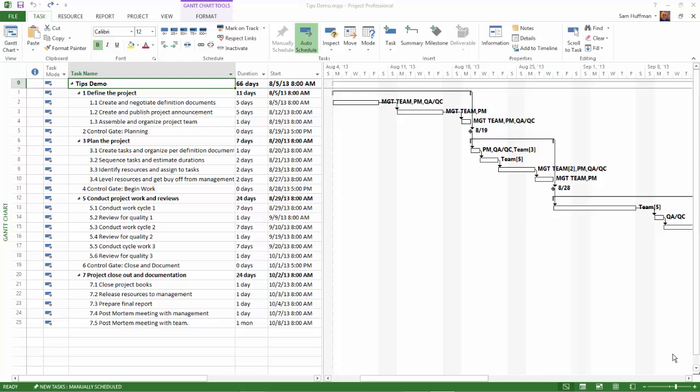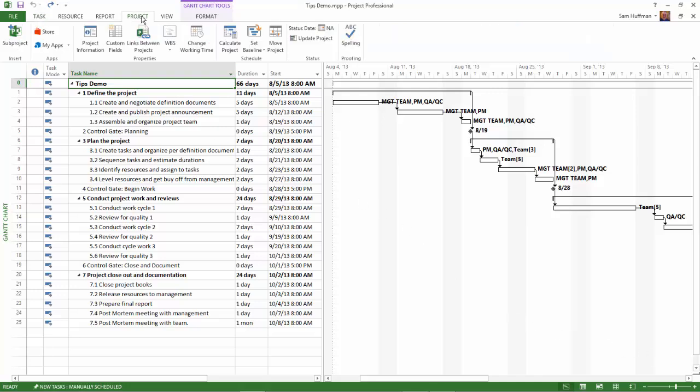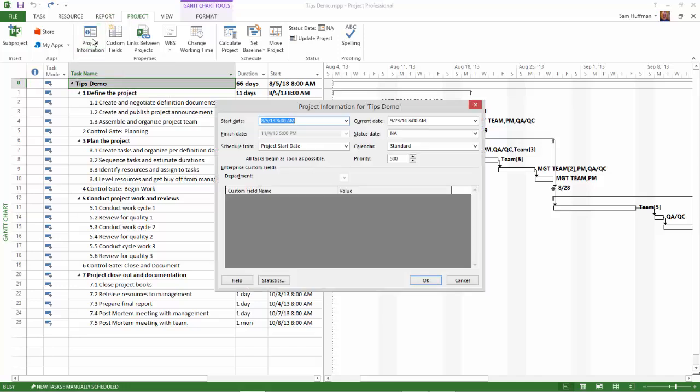To change the start date of the project, click on the Project tab, and then click on the Project Information button. Note the current start date, and then enter the new project start date in the start date field.